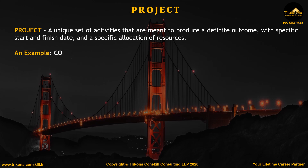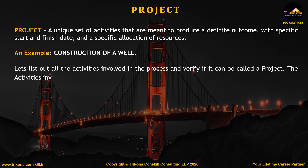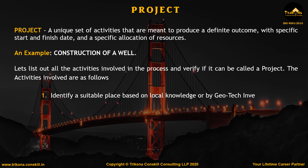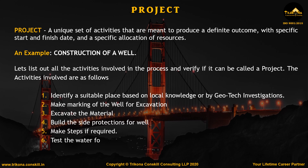An example: Construction of a Well. Let's list out all the activities involved in the process. The activities involved are: identify a suitable place based on local knowledge or by geotech investigations; make marking of the well for excavation; excavate the material; build the side protections for the well; make steps if required; test the water for consumption; install mechanism for lifting water; start using the well.